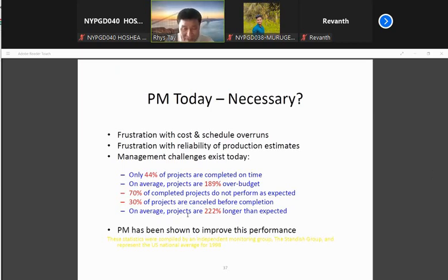the project manager, the director, the management must be able to determine the timeline. How to determine the correct timeline: first, based on the experience that you have, a similar project that you did before, then you know what the timeline is, right?